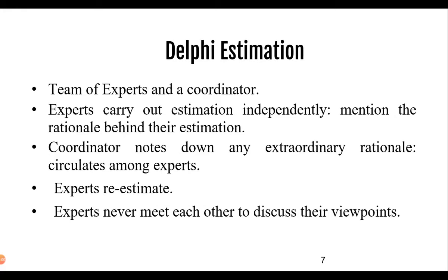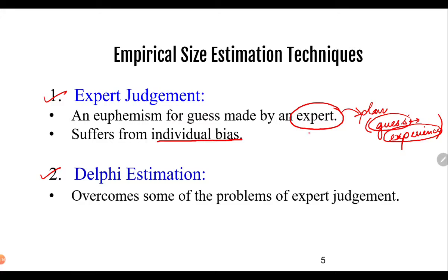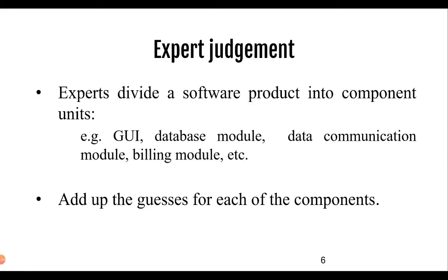Delphi estimation in detail. So here in Delphi estimation, we will have a team of experts and a coordinator. Initially in our expert judgment, we had one expert. Before we go into Delphi, let us talk some more about expert judgment. This expert will divide the software product into some component units, based on his experience and his understanding of the project.